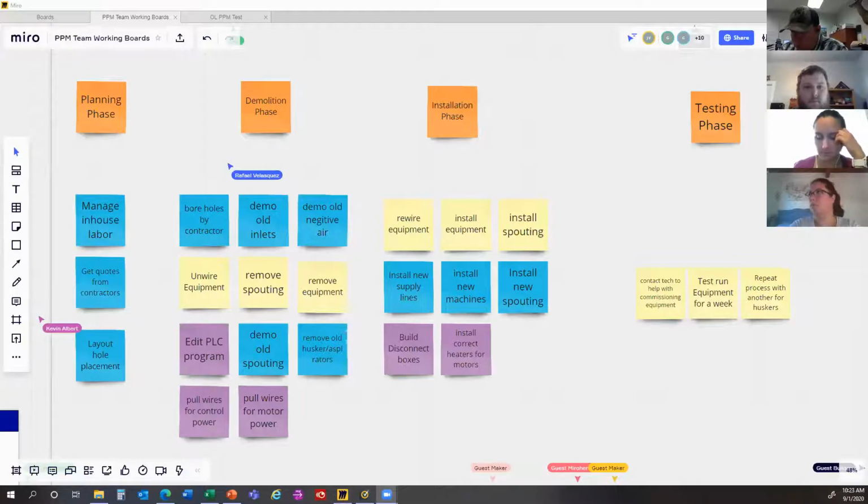Okay, and again, you're going to have time to go work on this, because everybody's going to go back and work on your work breakdown structure to make it more complete and more detailed. The purpose of what we just did is really to create a framework. Remember what I said earlier about a work breakdown structure: you can create one by deliverables, by project phase, by chunking of work, by how I want to manage it from a project perspective.